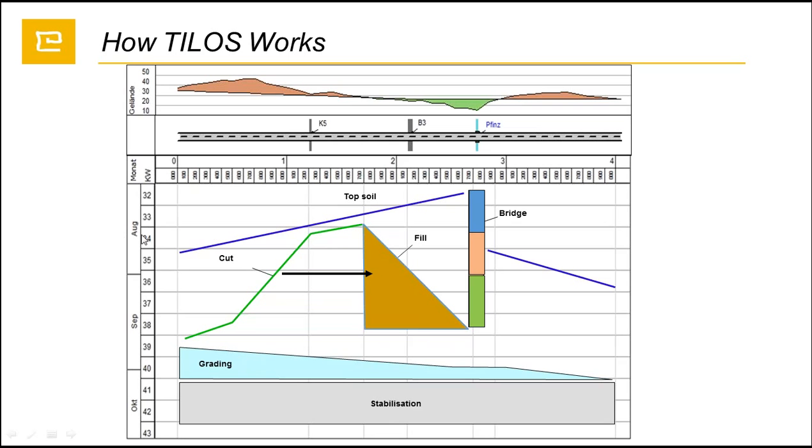So in this case, we are able to see, for instance, let's say that our cutting activity will start on the second week of August, and it will start in 1,700. So in this way, we are able to see not only when our activity is going to start, finish, or be performed, but also where. So this is called a two-dimensional chart.